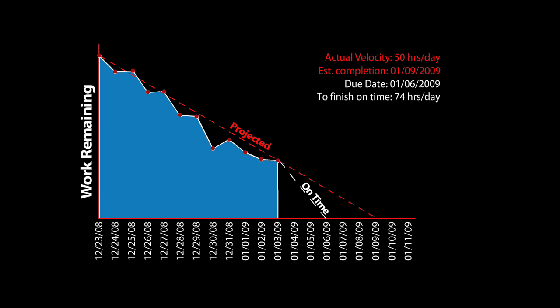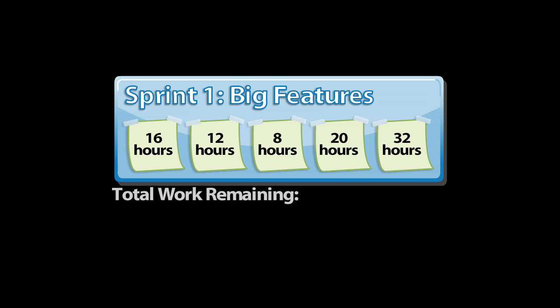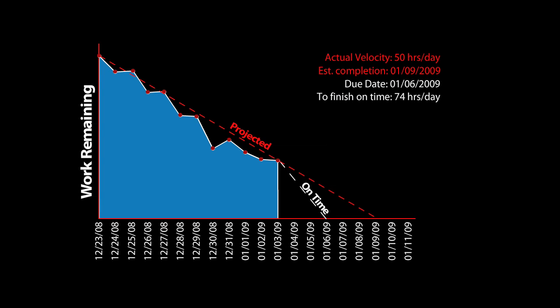So let's talk a little about where the data for this incredibly useful burn-down chart comes from. As you recall, part of the release planning process was to create an estimate for each feature in the product backlog. The collection of these estimates for a given sprint represents the total amount of work that must be done to complete that sprint. As each team member goes through and makes progress on one or more of the features, they simply update the amount of time remaining for each of their own items. So the total amount of time remaining on the group of features that make up a sprint changes on a day-by-day basis, hopefully going downward until it hits 0 when the sprint is complete. The burn-down chart aggregates the remaining work data and shows it visually. It's brilliant because it communicates a massive amount of information in just a few seconds.